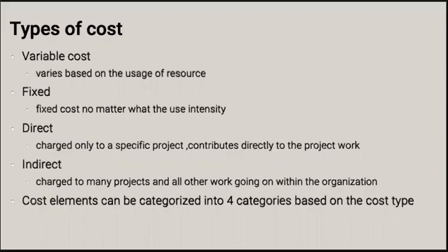So, for instance, if you're renting an office in order to carry out project work, and that office is rented per, say, 1,200 euros per square foot, or some other ridiculous number like that. I don't know what the rates are, maybe less than 1,200 anyway. But that rate doesn't change whether you're in the office 2 hours a week or 23 hours a day. So the rate is going to remain the same.